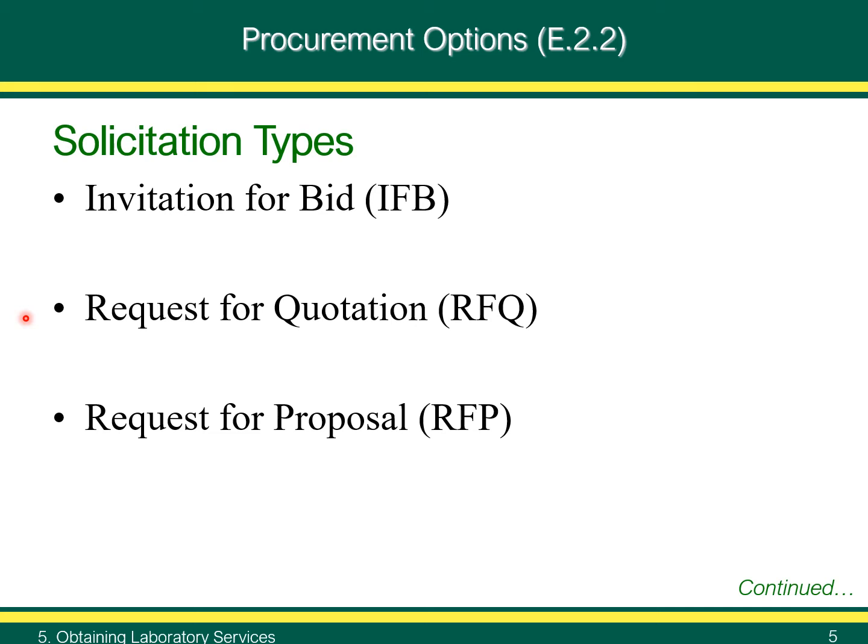A micro purchase order, or MPT, is authorized under the FAR for purchases below $10,000. No justification or competition is required. Note that the threshold limits provided in this training module were current as of the end of 2020.